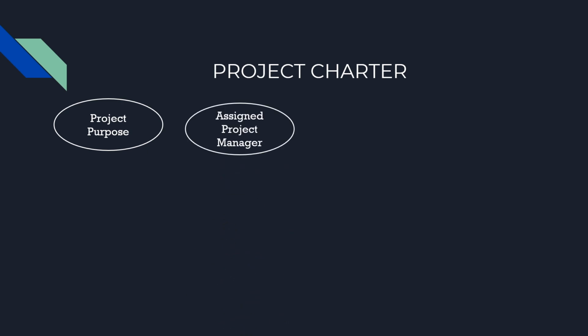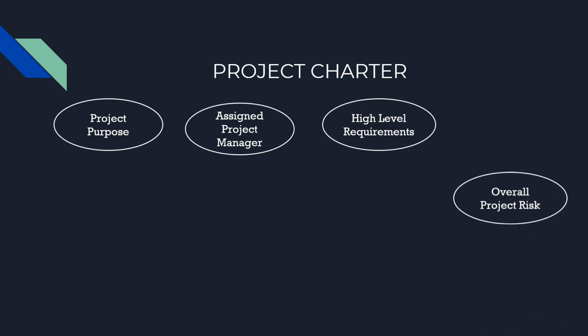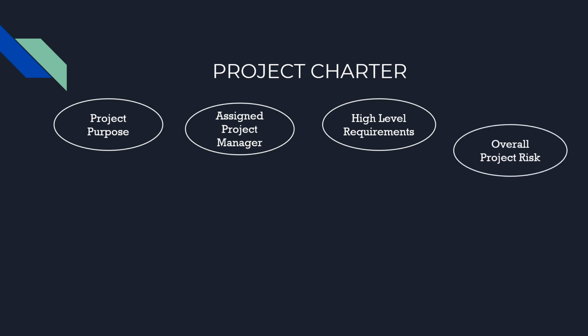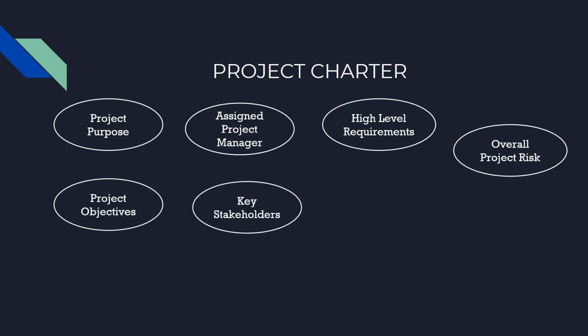Let's understand the components of the project charter. It defines the project purposes. It assigns the project manager to the project, and describes the high-level requirements, overall project risk, project objectives, key stakeholders, and summary milestones.